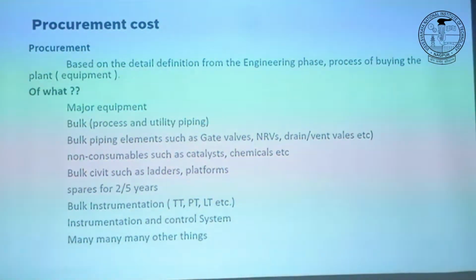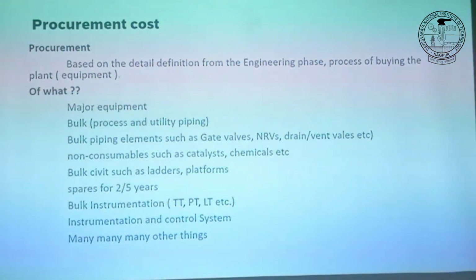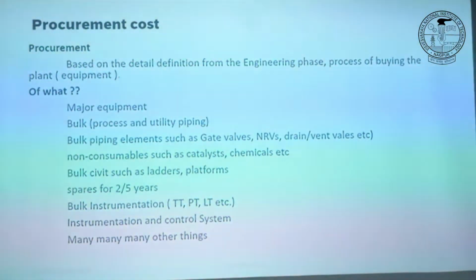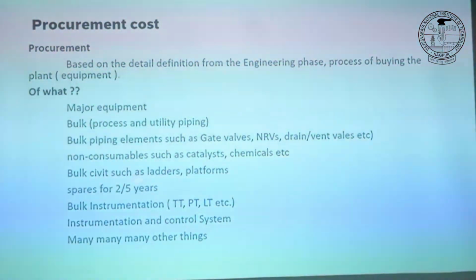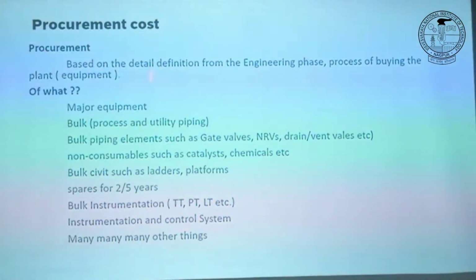You have to balance. Do you want to pay for the whole system with this automatic system, or do you say, okay, instead of calling the vendor and waiting 3-4 days for him to send me the impeller, I put it in my almirah, pay a very small amount. With this, I save 2 or 3 days. You always have to think about what is the best possible. So then all other instrumentation is here in this part.